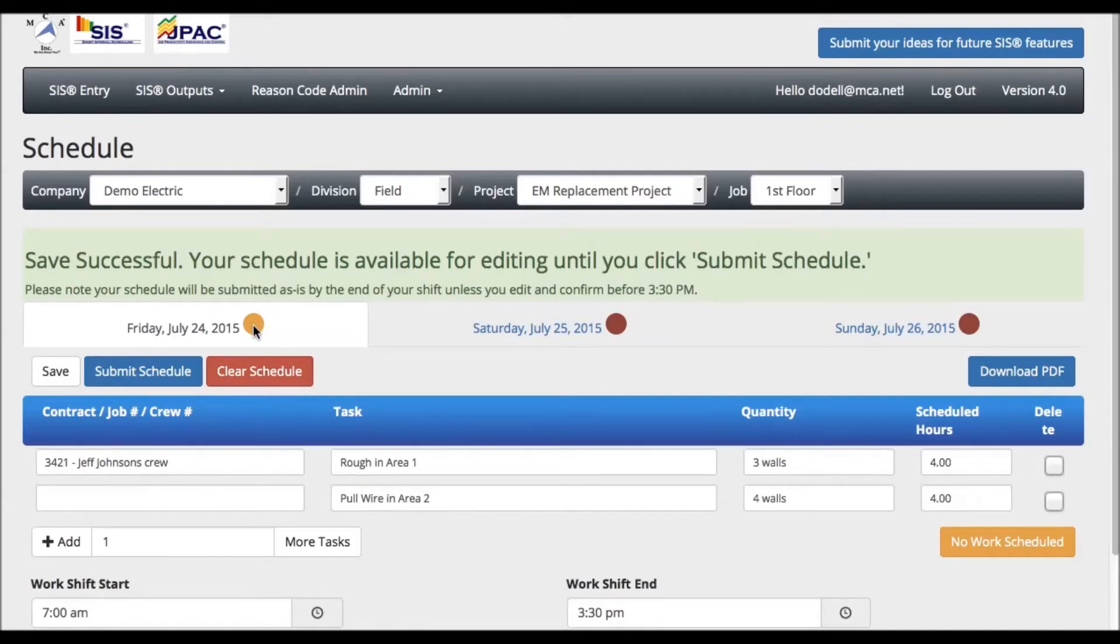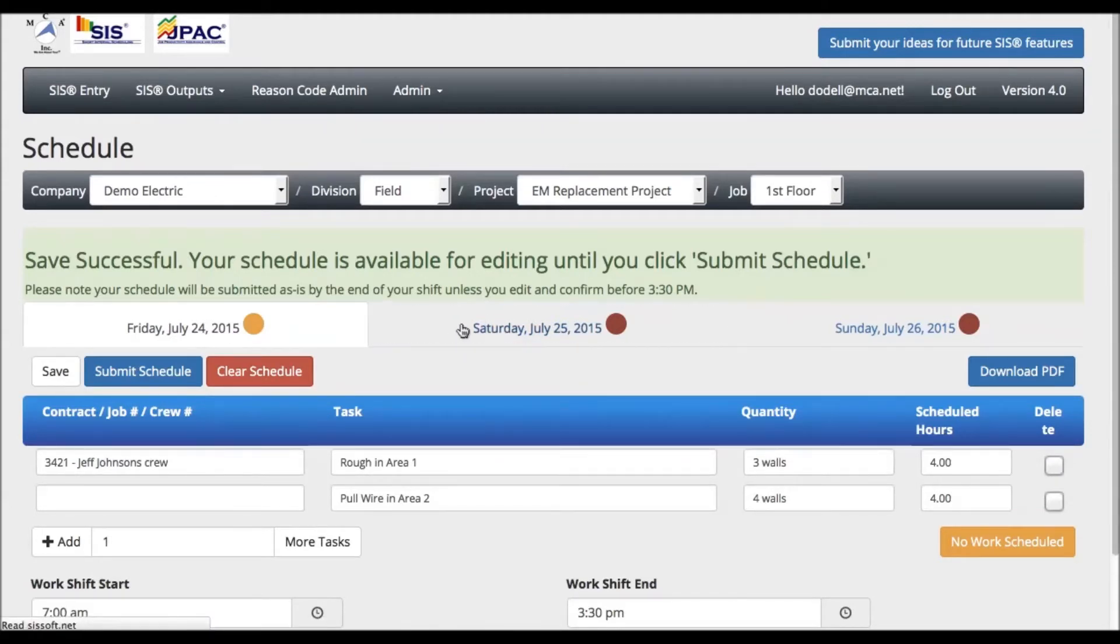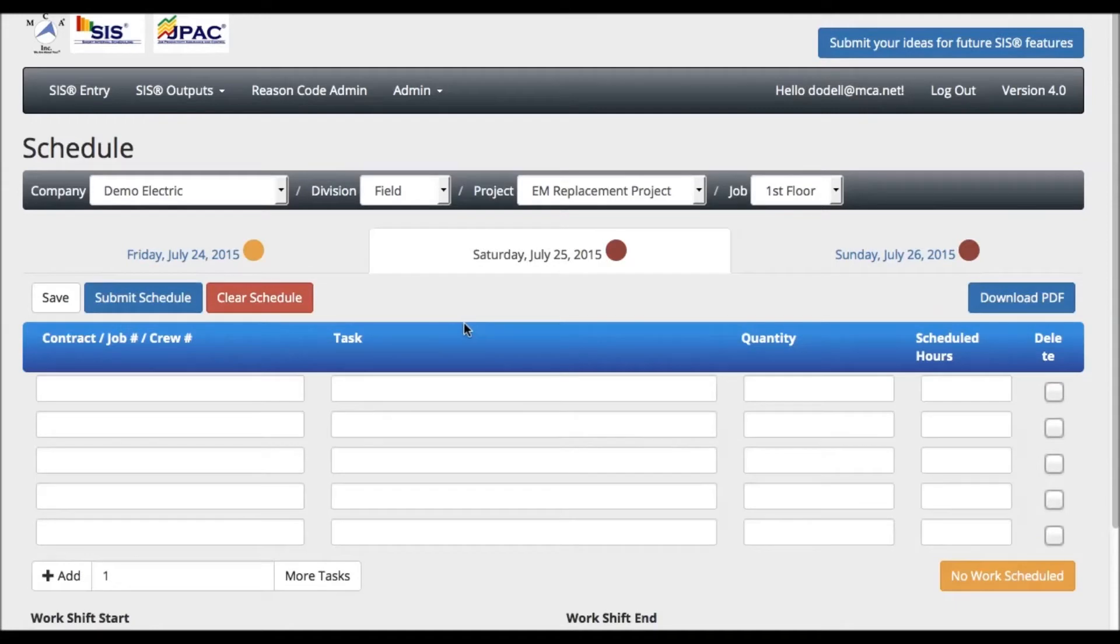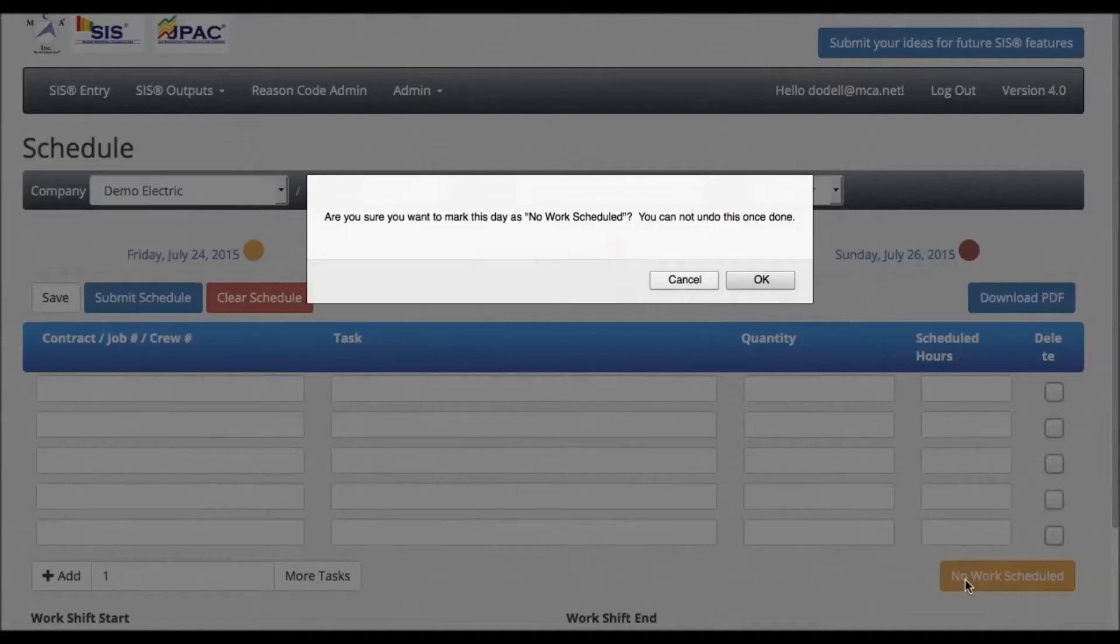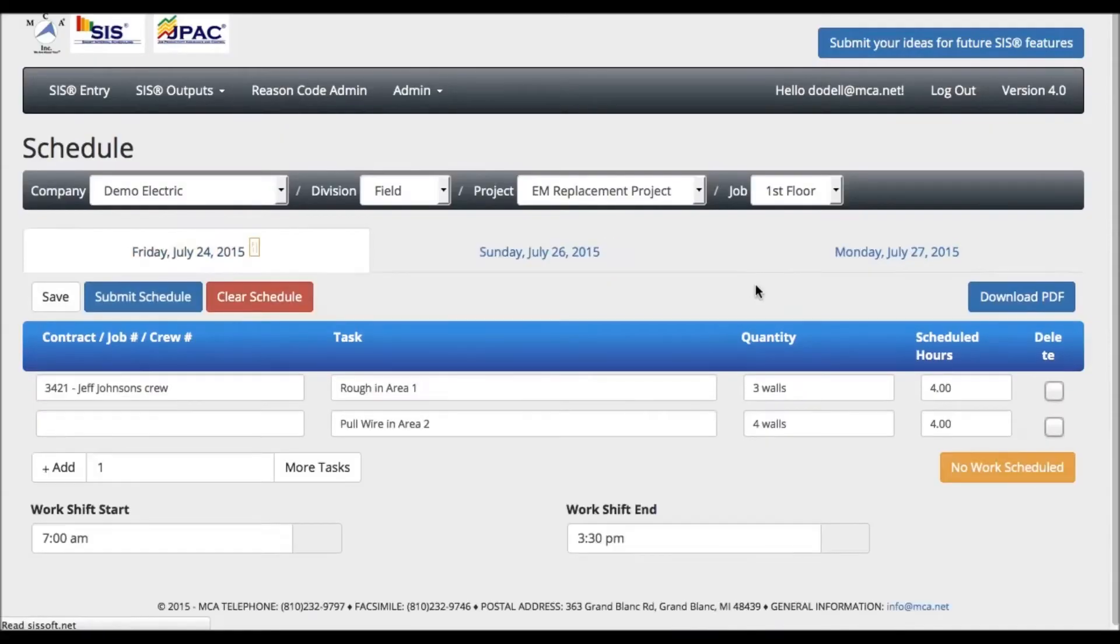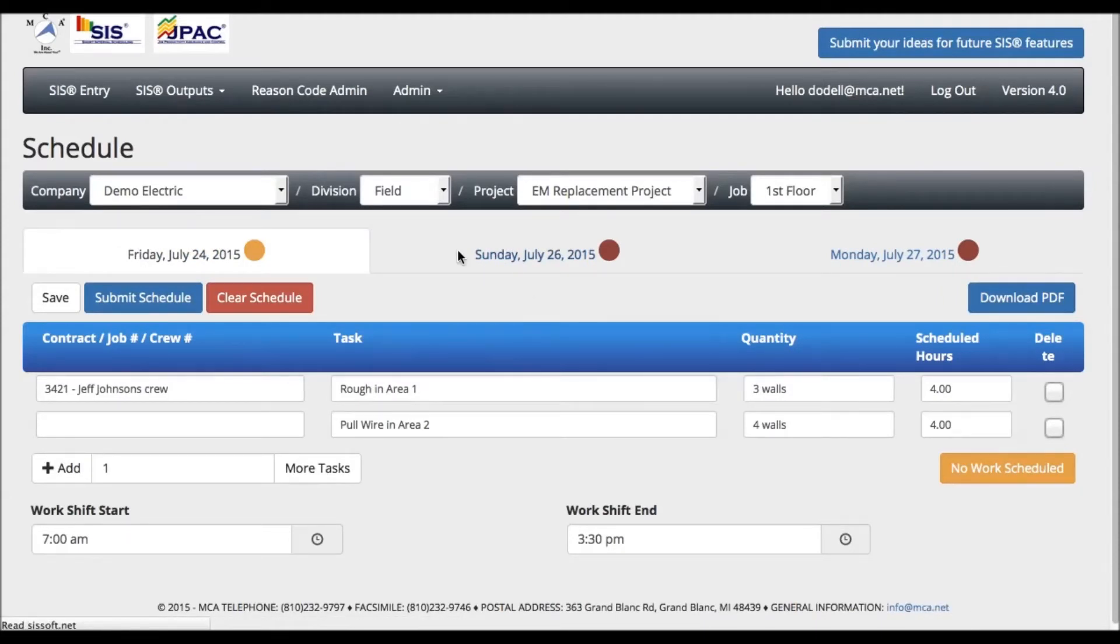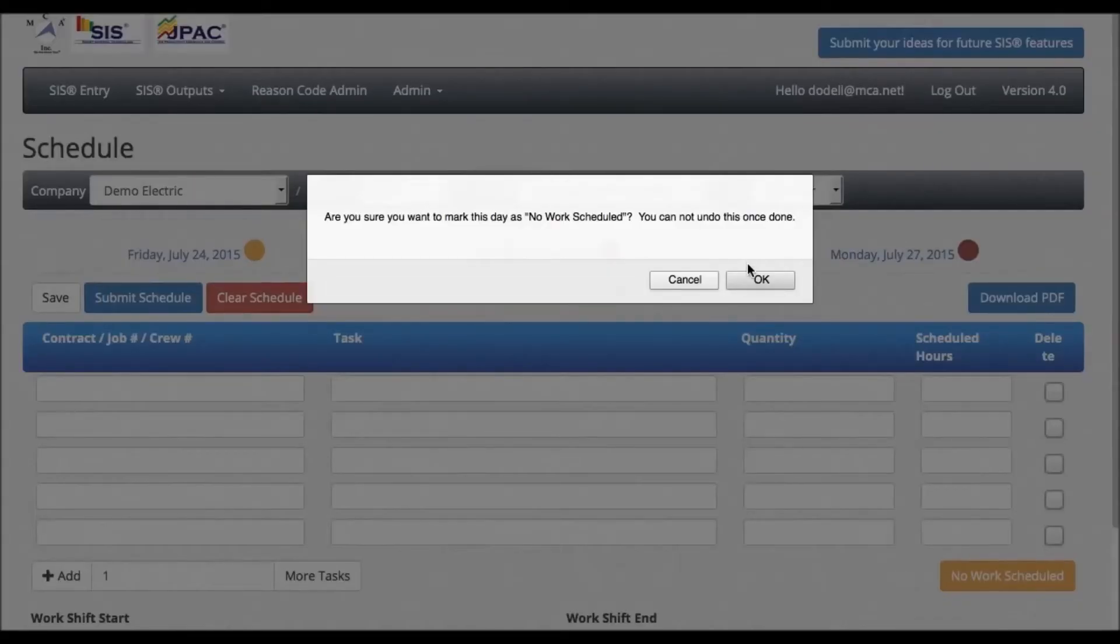You can now select the next day to plan. If you have no work scheduled for this day, click the No Work Scheduled button in the lower right corner. A pop-up screen will appear asking you to confirm that you want to mark this day as No Work Scheduled. It also warns you that you cannot undo this once done. Press OK. Note that Saturday has been removed from your schedule. You can do the same for Sunday as well. The No Work Scheduled button can be used for any day that you do not plan on being on the job site.